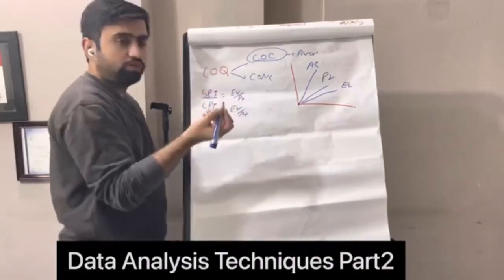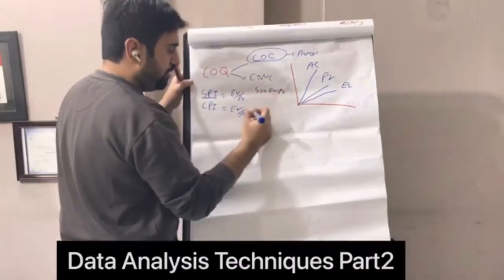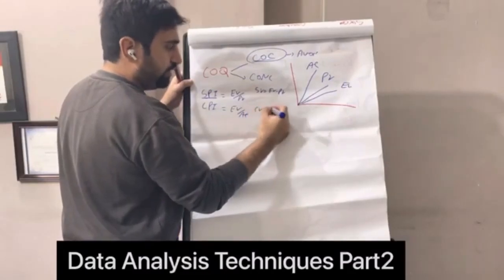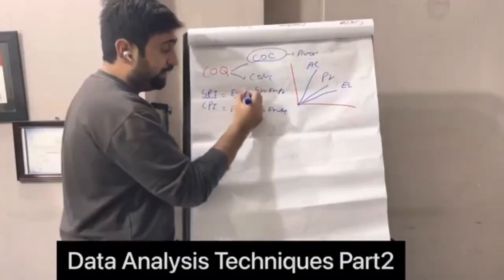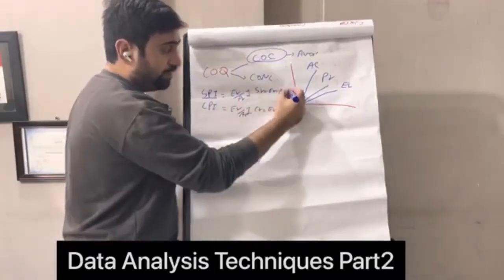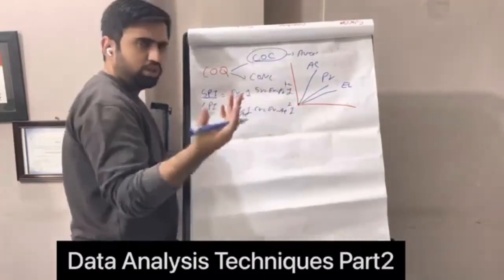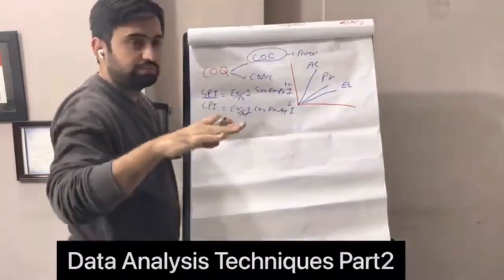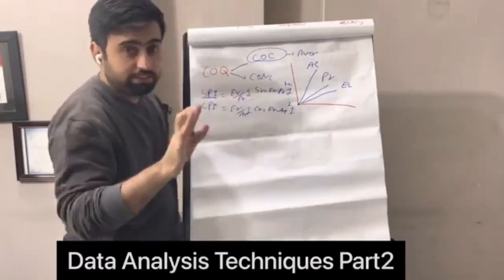The performance of schedule can also be variance, earned value minus planned value, or for cost, earned value minus actual cost. Understand this for the exam. Greater than 1, even in the variance, positive variance, is a good thing. Equal to 1 or 0 variance is okay. Less than 1 is the bad thing.